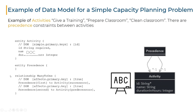This is the second part of our model. Here we describe the activities that have to be performed by our resources. They are organized by precedence. When a precedence exists between two activities, one activity can start only after the other is finished. To describe this information, we use three declarations. The first describes the activity entity with its three attributes. The second describes the precedence entity. And the last one describes the relationship between the two entities. The activity entity has five attributes: an ID, a name, duration in hours, successors, and predecessors.